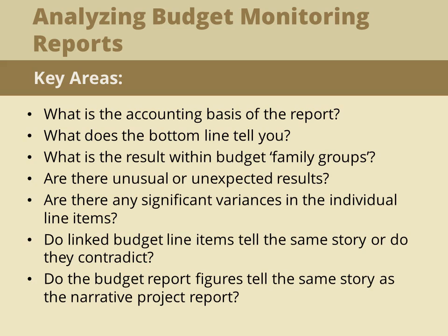Look for unusual or unexpected results. Could this be an indication of a miscoding or abuse? Are there any significant variances in the individual line items? Are the reasons for the differences explained? For example, the miscellaneous expenses budget is substantially and unexpectedly overspent and therefore must be investigated or looked into.